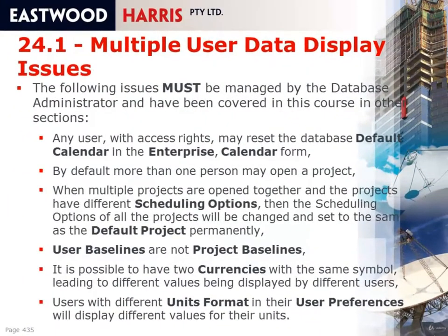So in a large database with a number of users, the database administrator is very important to ensure that the calendars are kept consistent, to make sure that only one person has access to a project, keep an eye on things like scheduling options, user baselines, currencies, and ensure consistency in reporting by giving guidance on units format and user preferences.